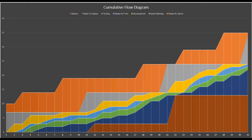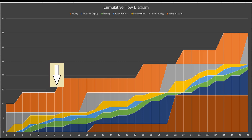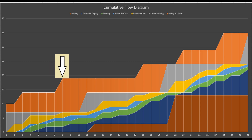As a coach going to any team, the first thing I would ask for is: can you show me a CFD? Because looking at a CFD tells me a lot of things. For example, we can quickly see there is a point in time where there are items that are ready for sprint. Anytime we see a jump in this line right here, it shows an increase in items that are ready for sprint — so the jump is really good.